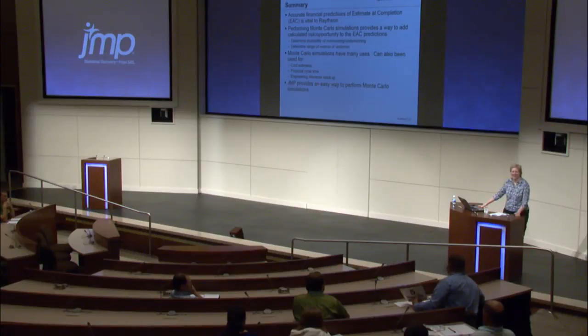when you use the simulator, you can sample a distribution from another table. So for example, if you were to make a table that has 2 rows and you have your formula for JMP dot times your loaded labor rate and totals, and you put the min and the max in there, then you can run the simulator. Go to graph and profiler to profile that formula, and from that you can start the simulator, and in that simulator you can say that you want a sampled distribution from another table instead of a fixed distribution, and you can point at that original table that had the variables in it. I know that sounds horribly complicated, but if you saw it, you'd be like, oh yeah.